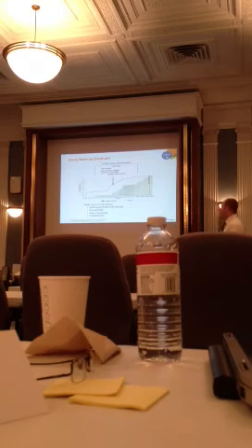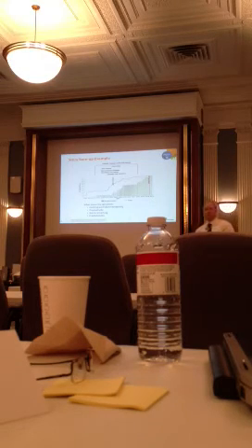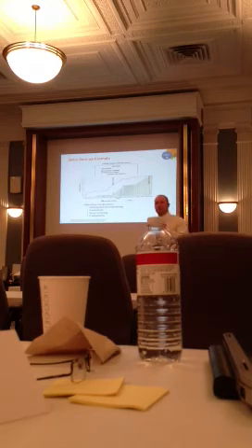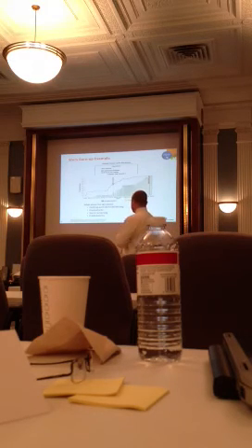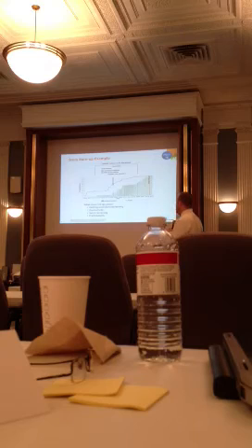On the y-axis here, we have the number of story points accepted. Each one of these lines here is a week. Keep in mind our iterations are 2 weeks, so every 2 of them is another iteration. This black line is representative of the number of story points that are in the backlog. And these red lines are our release dates, our release time box.